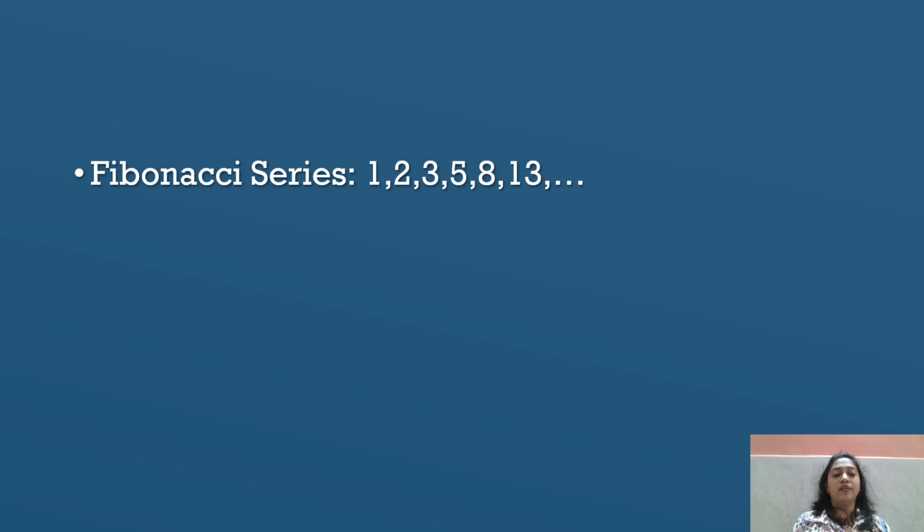So we have the Fibonacci series, that is 1, 2, 3, 5, 8, and 13, and so on. We use these estimation points while creating and estimating our user stories. In practice, we mostly use up to 8, not much more than that.